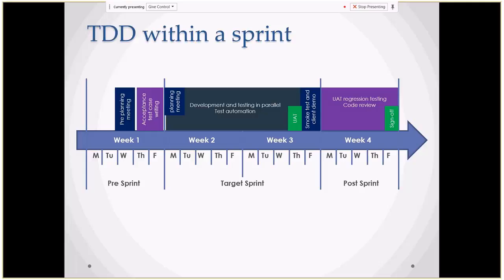Then when the sprint starts, there's a planning meeting. As Dilanka correctly said, there will be a planning poker in that to decide if we can accommodate all these user stories into this sprint. Let's say we have taken 15 user stories here. We will be doing capacity planning for those user stories and see if we can accommodate them. In this meeting, we can decide we can only take 10 user stories from these 15 because we don't have capacity. So we'll be taking those 10 user stories.